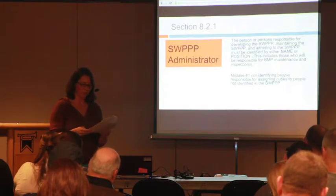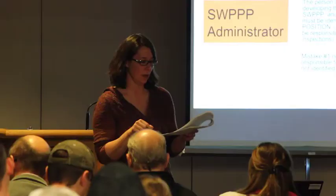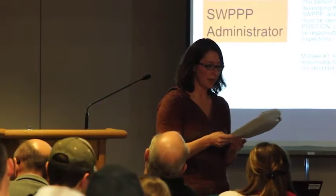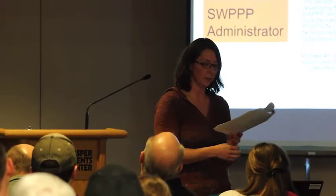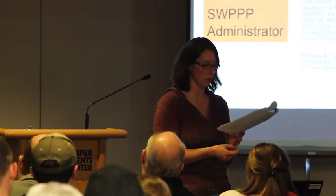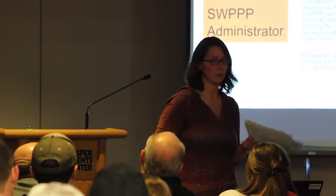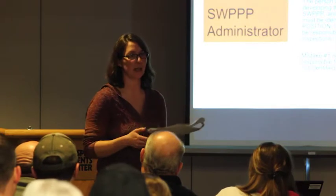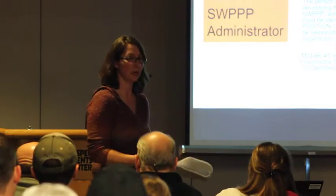A qualified person is one who's familiar with the requirements of the SWIP, so they better know your SWIP. They better know the permit conditions. They must be knowledgeable and experienced in the application of erosion and sediment control BMPs and the installation, inspection, and maintenance of those controls, as well as any non-sediment control BMPs identified in the project SWIP. So they have to have pretty good knowledge of the permit, the SWIP, and the site. And if they aren't, they're likely gonna miss stuff.